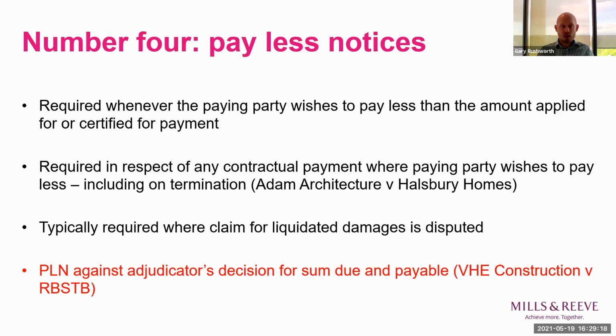So if there's a delay to the completion date and the employer serves the various notices they need to levy liquidated damages, then if the contractor disputes those deductions and disputes liability for delay, the contractor may well need to serve a pay less notice against any application for certification of the liquidated damages sums. And just to point out in relation to pay less notices, it's long been established that you can't serve a pay less notice against an adjudicator's decision for a sum that's already due and payable. So you can't try and avoid the effect of an adjudicator's decision just by issuing a pay less notice.